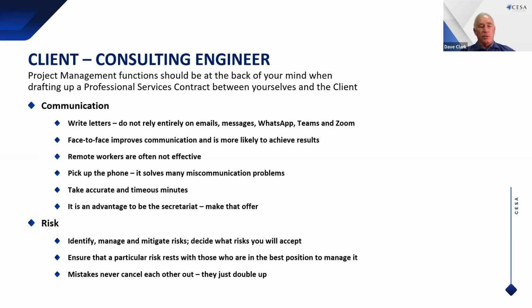In terms of risk, identify, manage, and mitigate risks and decide what risks you will accept. Ensure that a particular risk rests with those who are in the best position to manage it. And remember, mistakes never cancel each other out. They just double up.